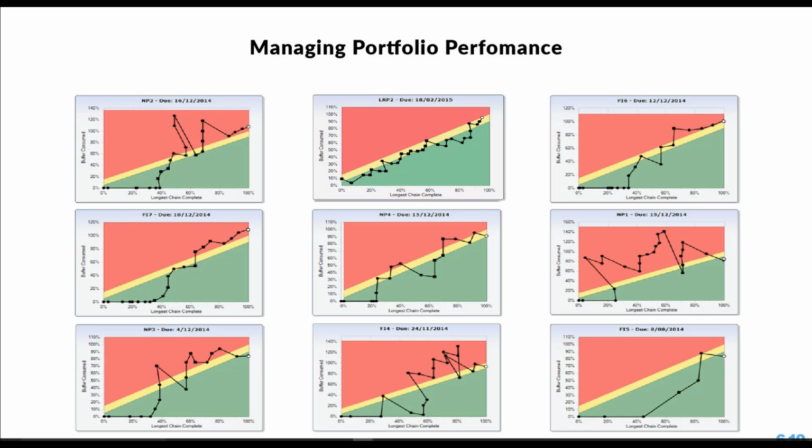This slide shows 9 different fever charts in the same project. Often they start off way down in the green, what my colleagues and I like to talk as caterpillar territory. But soon enough, reality kicks in. Often the flat line at the beginning is no more than the fact people have been completing tasks ahead of the time when all the controls and instrumentation are in place.